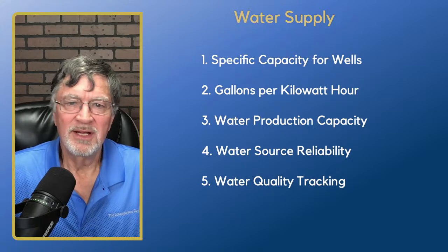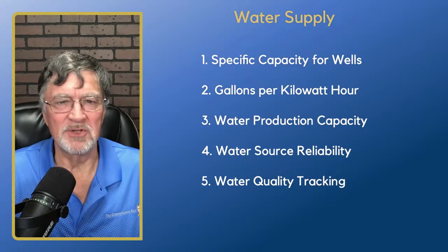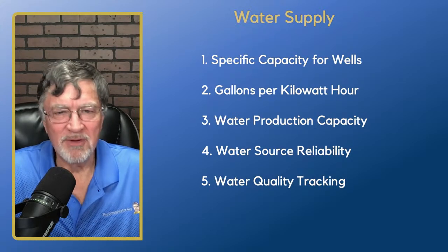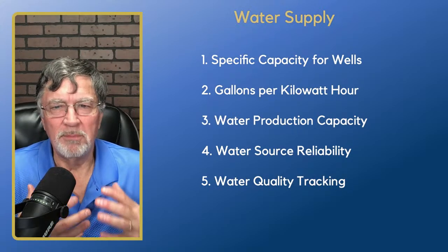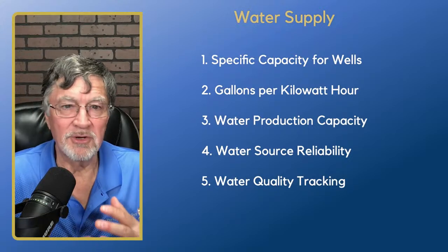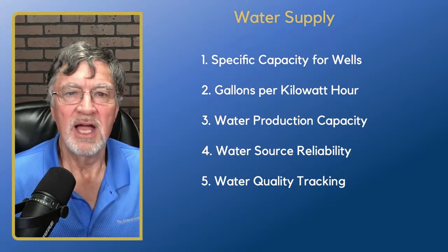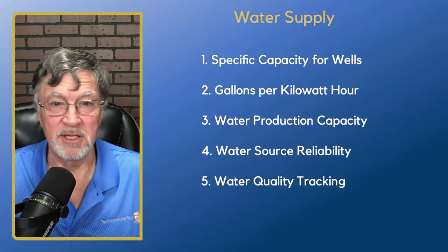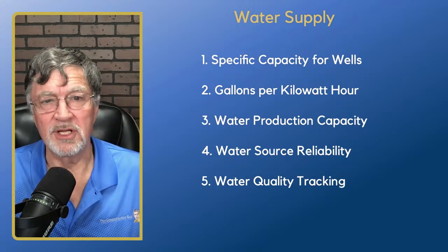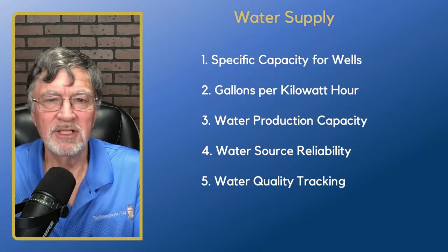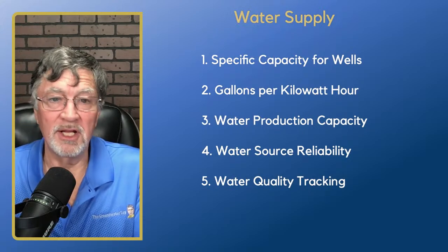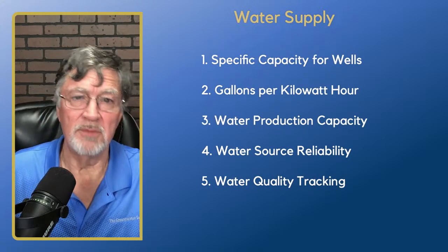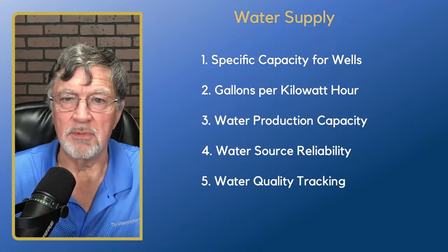So you can see maximum daily demand is not the same thing. That's something that's kind of mandated in our TMF requirements. But by tracking what our actual production capacity is, how much can we produce to fulfill the maximum daily demand? Now you can start to see and develop a pattern and look and see, are we going to need additional capacity down the road? And you can plan for that and set aside the money in the KPI.